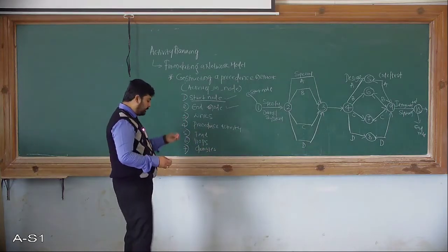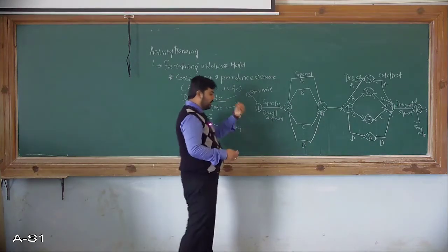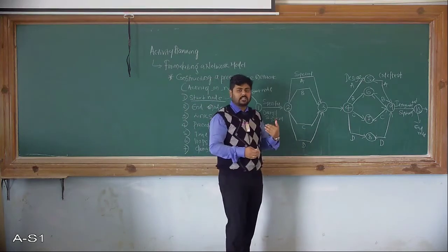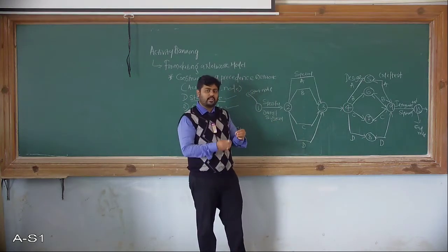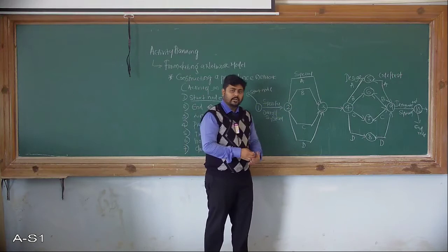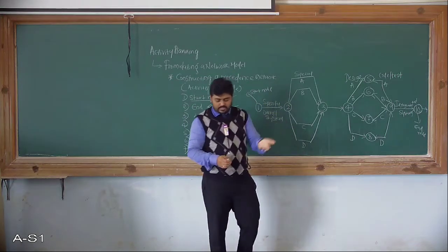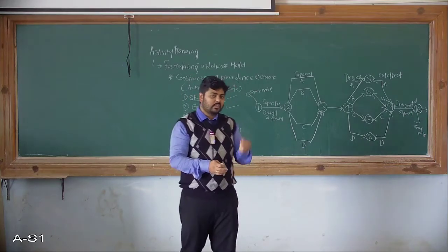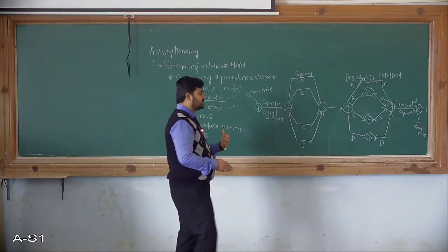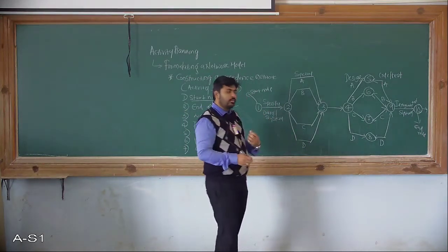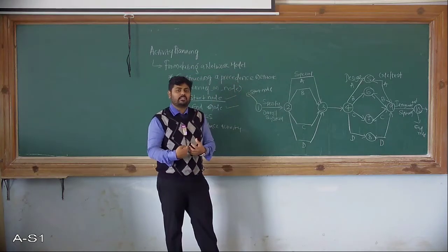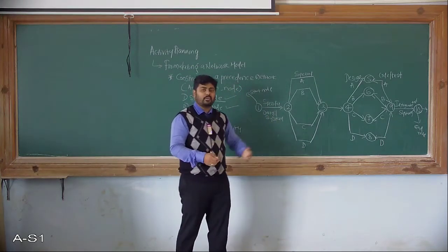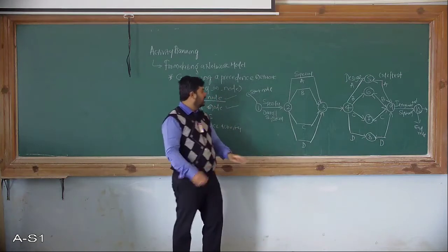So if they are dependent on each other, it means the previous node or segment is going to give some input to its next, the subsequent activity which is following that previous activity. In that case, if you are expecting some kind of input from the previous node or activity, you cannot proceed further. So in that case it is very much important.